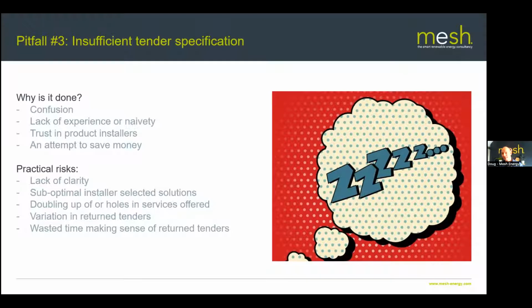They don't really understand that heat pumps and some of this other new renewable technology need more TLC. It is more complicated than just oil and gas boilers. You need to do some proper specifications, so whoever you're going out to has a proper framework for which they're doing quotes, and ideally some kind of suggested brands. There are good brands, there are not so good brands. Where does the client sit in there?